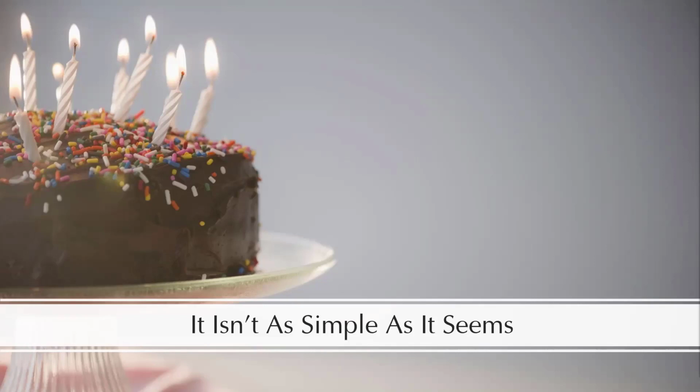Oh, crud. The butter needed to come to room temperature. So now I'm backed up because I can't make the frosting and frost the cake. While the cake cools, I might be able to let the butter come to room temp, but if it was really hard or I had it frozen or something, now I'm going to have to wait. So that's where you start realizing that the timeline and when things happen is super important.